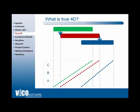Big guesstimates usually end us in hot water when we actually get through to the site and it unfolds and the firefighting that generally evolves on site is somewhat to do with this traditional way of setting a task to be as soon as possible on a Gantt chart. And maybe we shouldn't actually start it at that point in time.